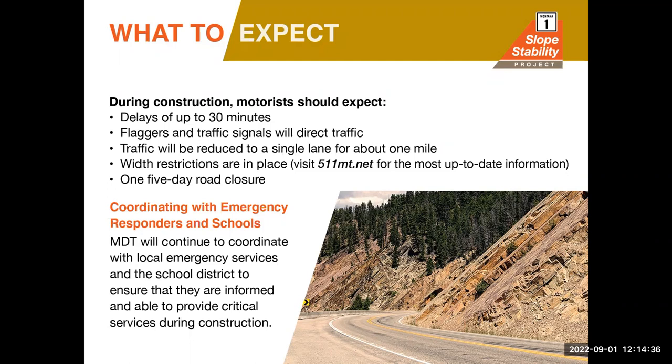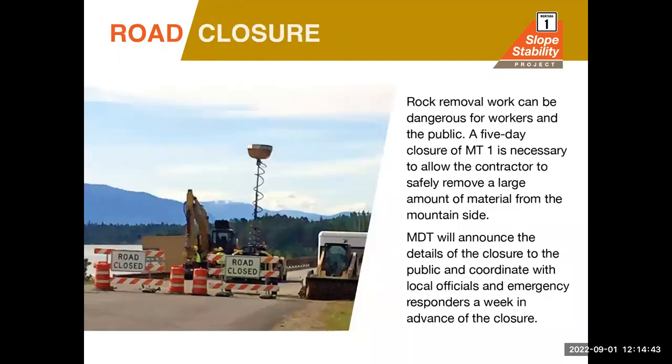The road closure, talk a little bit more about that. MDT and the contractor will try to minimize the inconvenience to the traveling public during construction. Work to remove rock materials from the side of the mountains can be dangerous for workers and the public. The 5-day closure is necessary day and night and is expected to allow the contractor to safely remove these materials. The public will be notified about this closure well in advance, and Brandon will talk more about those notifications later.